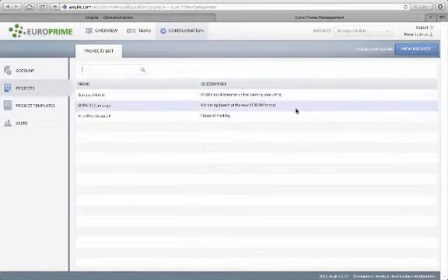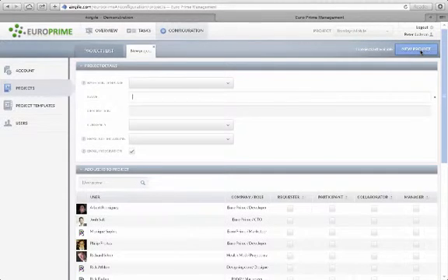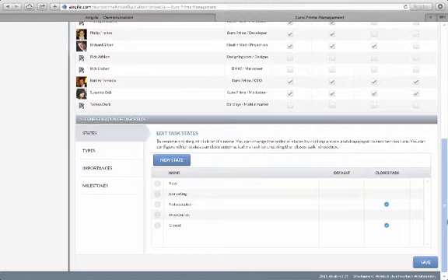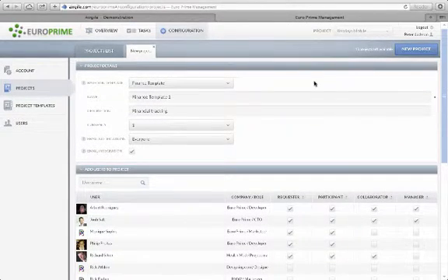Those projects can be used as templates if you want to reuse some of the tasks. Click on the red corner button to create a new project. If you choose a template, this project will copy all the tasks and fields previously customized by you on a template to the new project, instead of creating it from scratch. You will be able to edit and change the configuration at your will. This time, we just start a new project without a template.